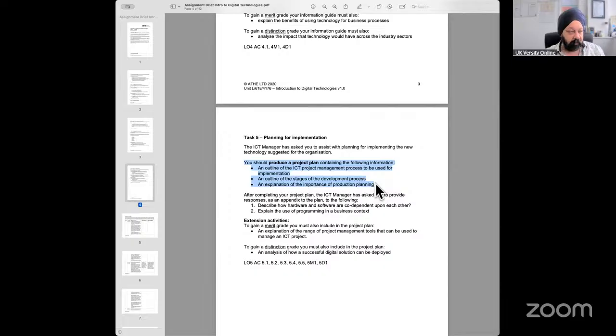If I give you an analogy here, imagine you were looking at building a house. One of the first things you would do, before you even buy the land, is shortlist and look at a place where you would build the house. You will shortlist the piece of land. Before you go ahead and purchase it, you'll apply for planning permission. You will ensure that an architect or a builder creates a blueprint. When the blueprint is done, you get into the costing of it. When the costing is done, you start looking at ordering and preparation. And then a plan or timeline is prepared for how the house would be built, even before you start building it and finally ordering the materials.